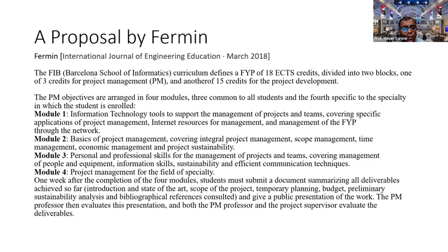So 1 week after the completion of the 4 modules, students must submit a document summarizing all deliverables achieved so far, like introduction and the state of the art, scope of the project, temporary planning, budget, preliminary sustainability analysis, and bibliographical references consulted, and give a public presentation of the work. The project management professor then evaluates this presentation, and both the PM professor and the project supervisor evaluate the deliverables.